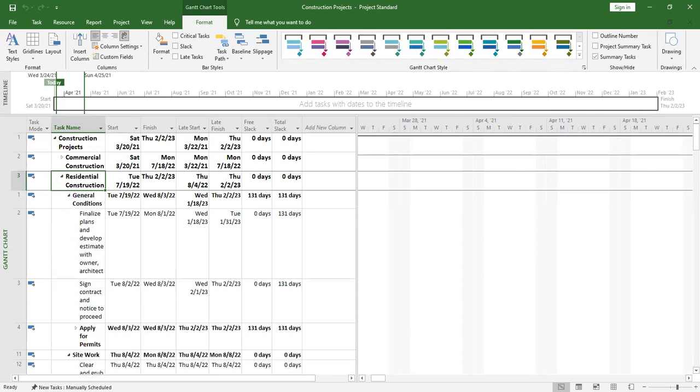But it looks like an organization chart. Now in this case, we have tasks. For example, if you're building a residential house, you're going to have residential house on top. Then under that, you may be having foundation, superstructure, and maybe roofing.